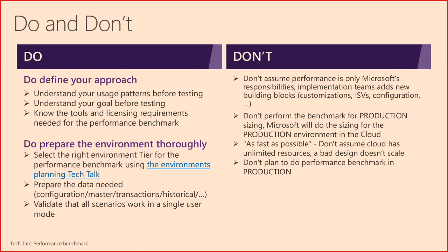You may need consultants to help you. You may need people from business or some data migration to happen first. So make sure to consider that data preparation. And as you're preparing the test scripts, make sure that they work in a single user mode first, multiple times to confirm that your tests are fully ready.